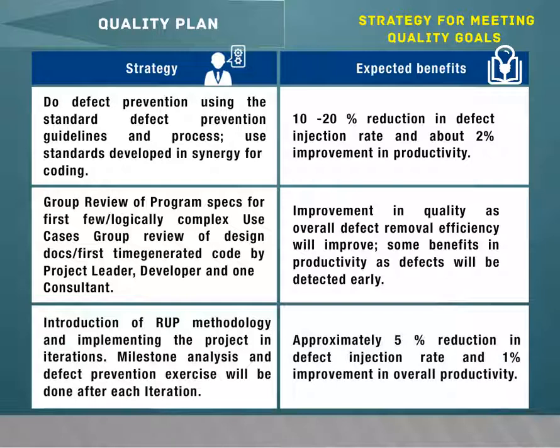Introduction of RUP methodology and implementing the project in iterations. Milestone analysis and defect prevention exercise will be done after each iteration. Approximately 5% reduction in defect injection rate and 1% improvement in overall productivity.